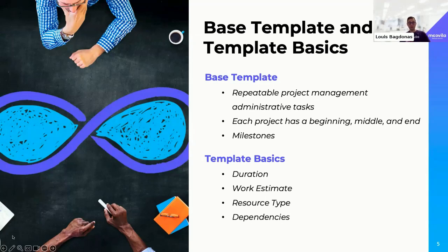So really maybe starting to think about how do we break that out, right? At the beginning of every project, do we do an internal kickoff? Do we do a client kickoff? Does everybody agree to that work plan, sign off and say, this is the timeline we're going to work against? Hopefully we've already got that budget in place from the pre-sales team, but maybe we say, yep, just to confirm, here's the budget, especially if it's a T&M project, time and material.